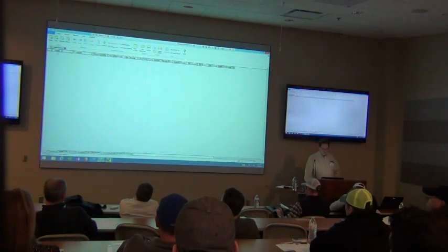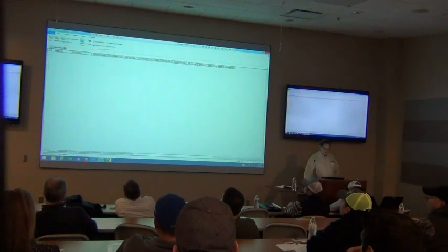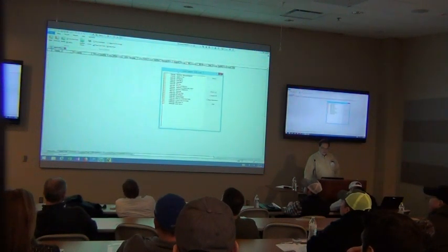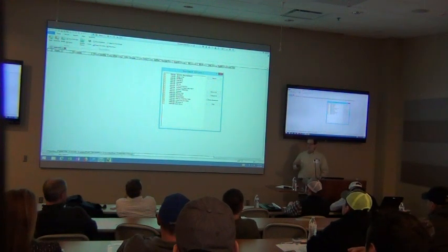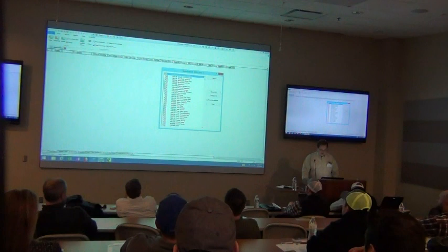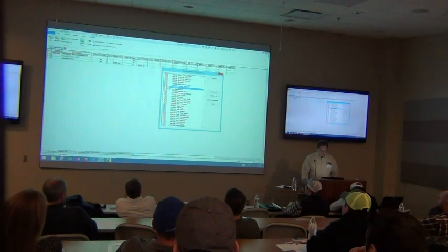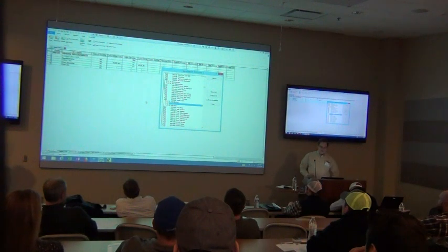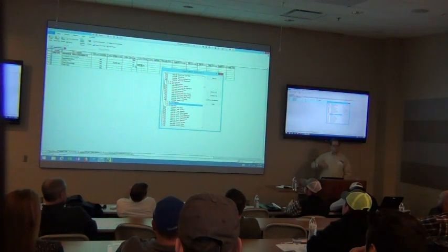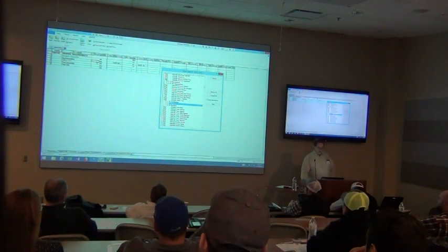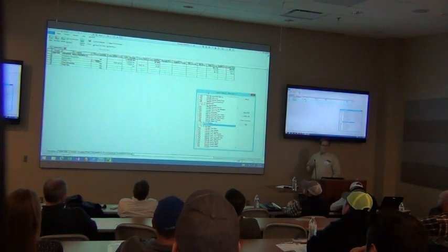Starting with a blank spreadsheet, we can go up to what's called quick takeoff in this product. The main thing is grabbing line items that I need to price and getting them out to the spreadsheet. Maybe I want supervision — I need a superintendent out there — maybe some utilities and things of that nature. Basically, I'm taking standardized pricing from a database that gives me a starting price and starting productivity, allowing me to put that content into the spreadsheet.